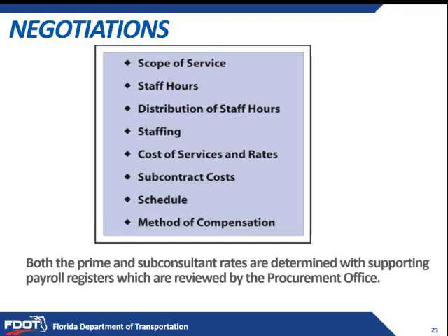Subcontract cost. The sub-consultant hours are negotiable for most sub-consultants. These hours are typically reviewed by our support sections who need to be included in this process. Both the prime and sub-consultant rates are determined with supporting payroll registers, which are reviewed by the procurement office.